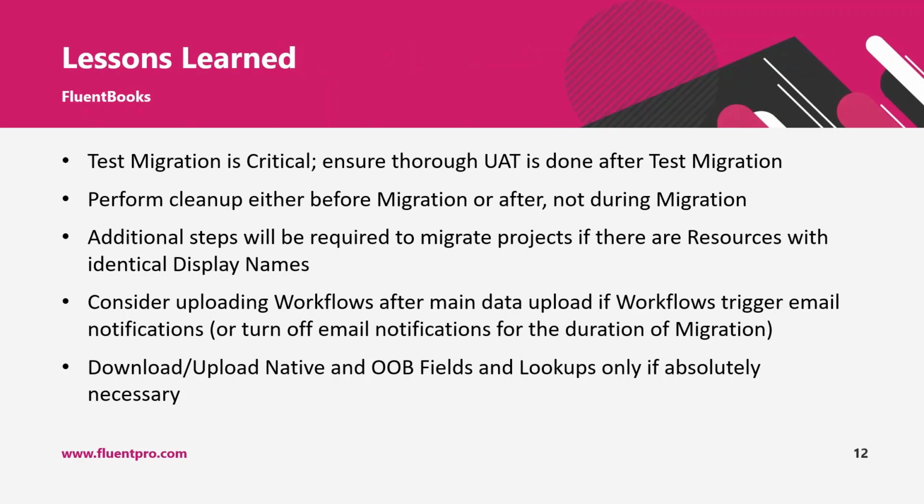So among lessons learned, I'd like to mention that test migration is critical, and sometimes it may seem that it could be a good idea to skip test migration or reduce it to save time. But since there are potentially some data and environment issues that could occur during the migration, it is better to catch and resolve them during the test migration, when users can still work with their source environment, before doing the production migration.